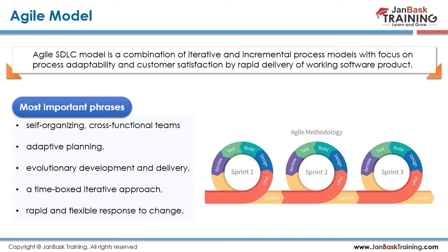The sprint length will be from 2 to 4 weeks. It's a standard time as per the BABOK guide, for the BA certification, and as per the Scrum Master Agile certification as well. It's limited to 2 to 4 weeks. That depends on your organization, whether they want to go with a 2-week sprint, a 3-week sprint, or a 4-week sprint. But it would not be lower than 2 and not higher than 4. Some go with 2 weeks, some with 3 weeks, and some follow the regular routine of a 4-week sprint.